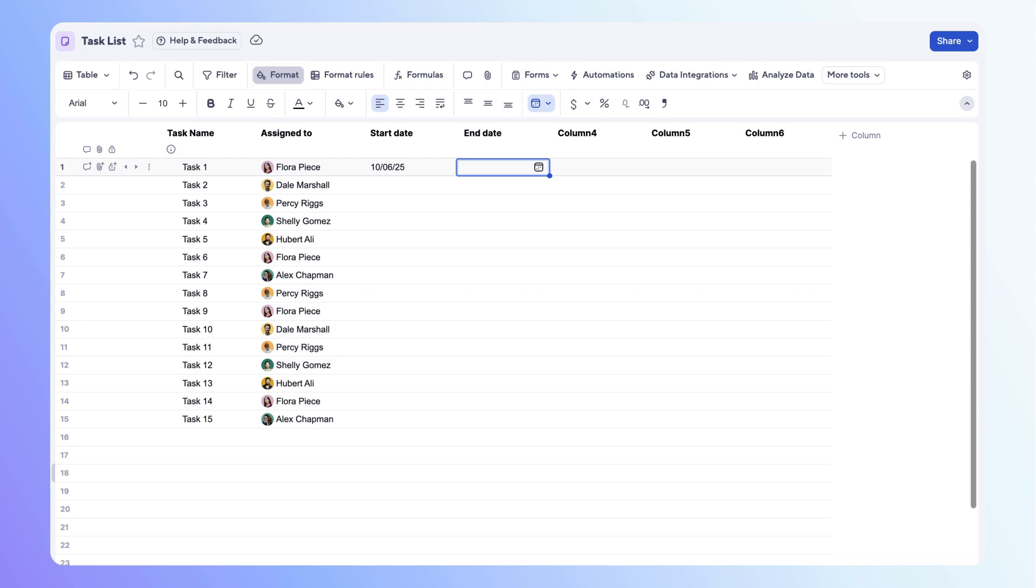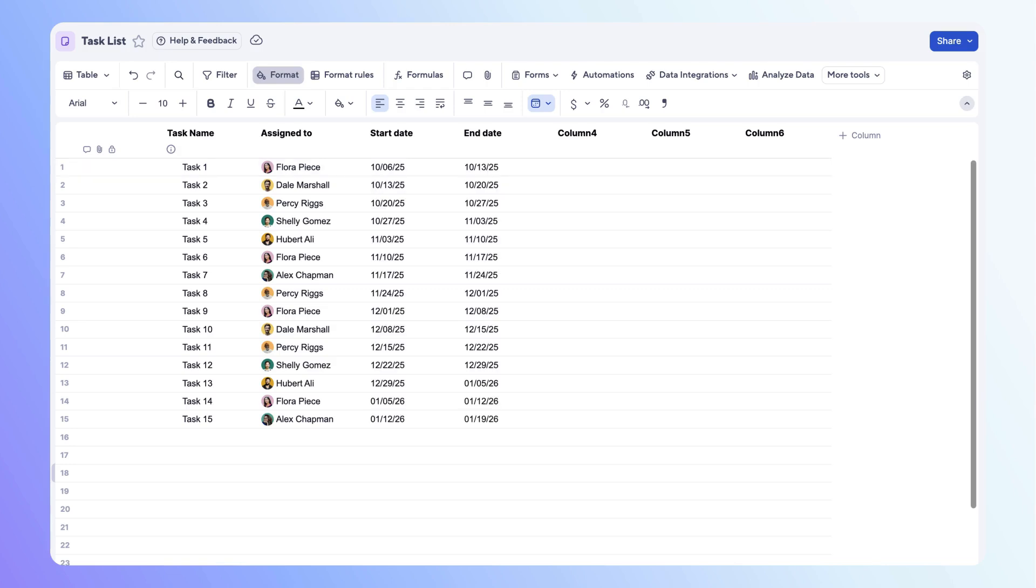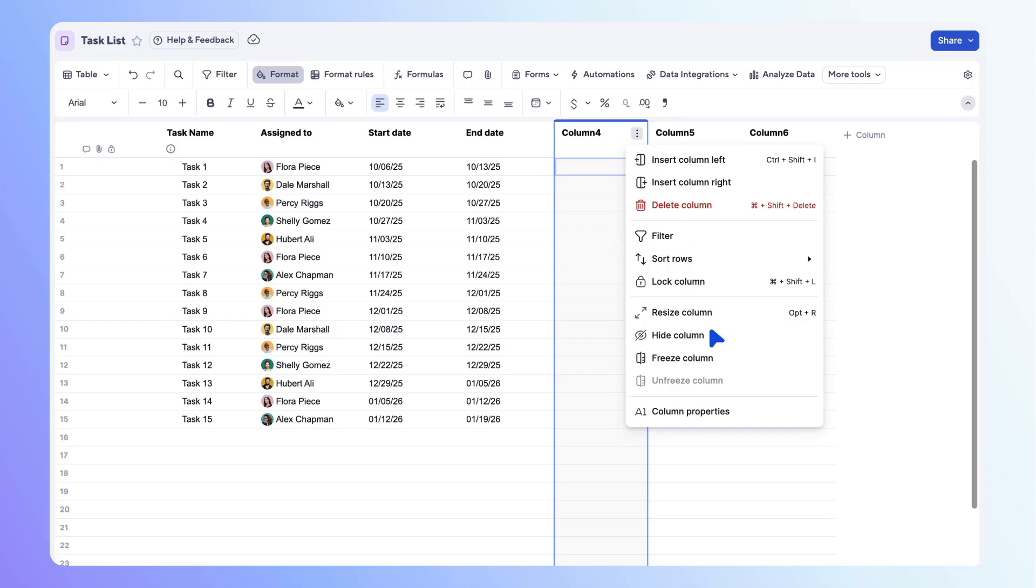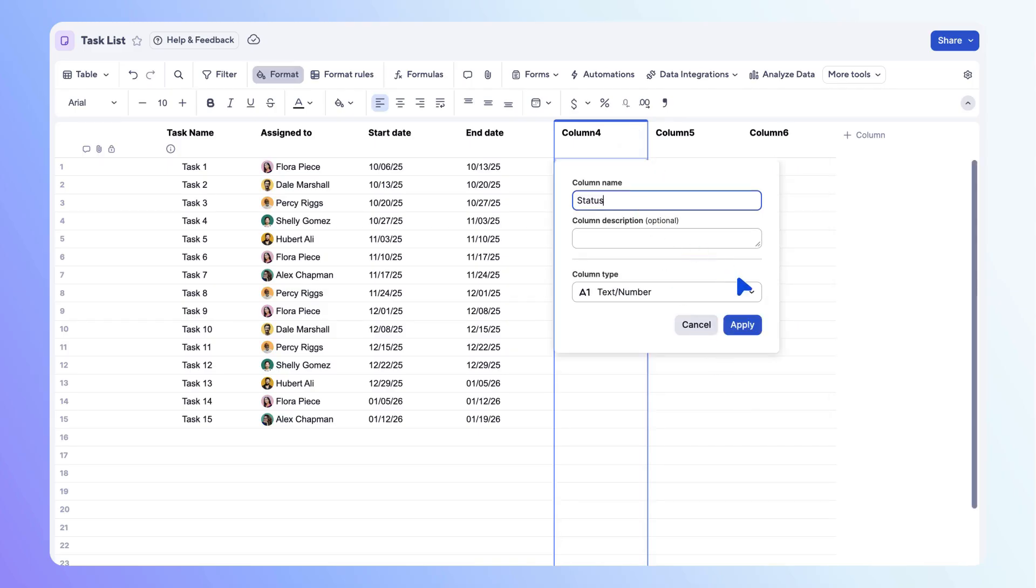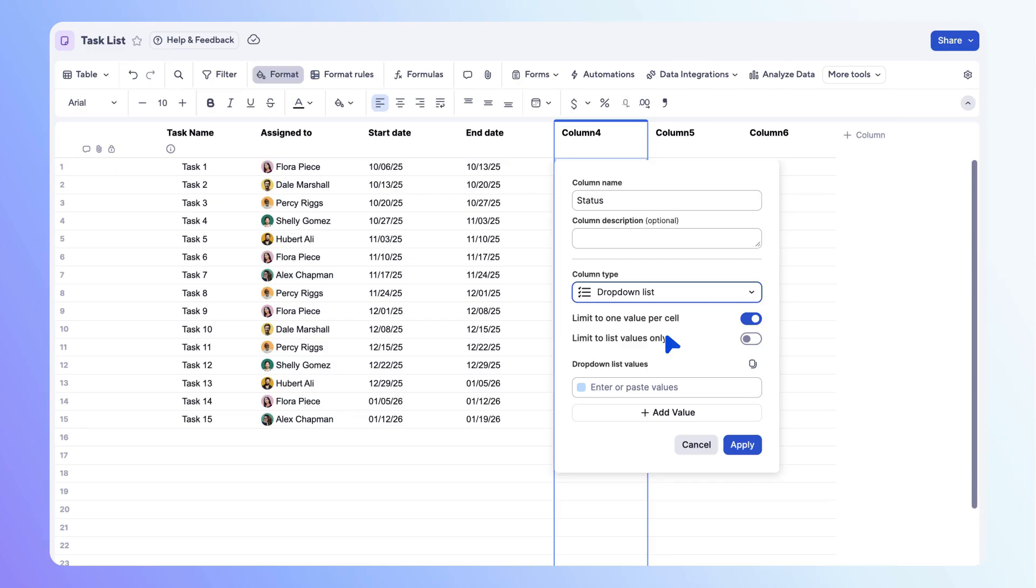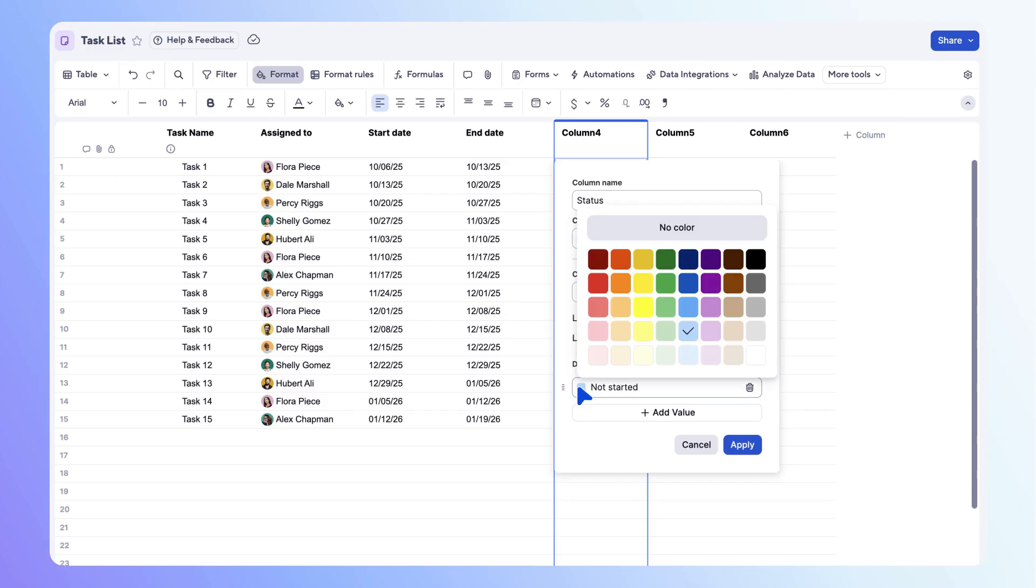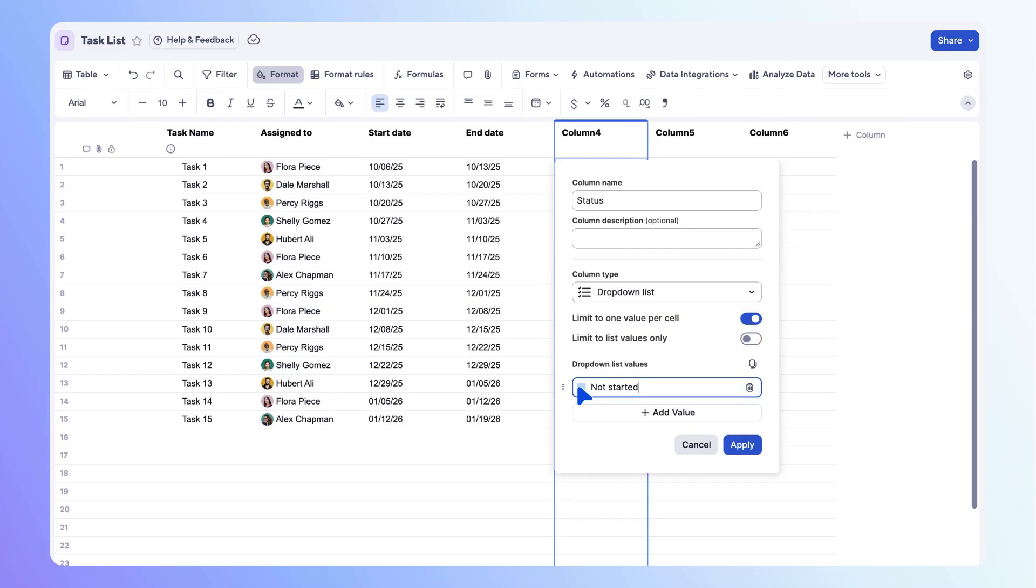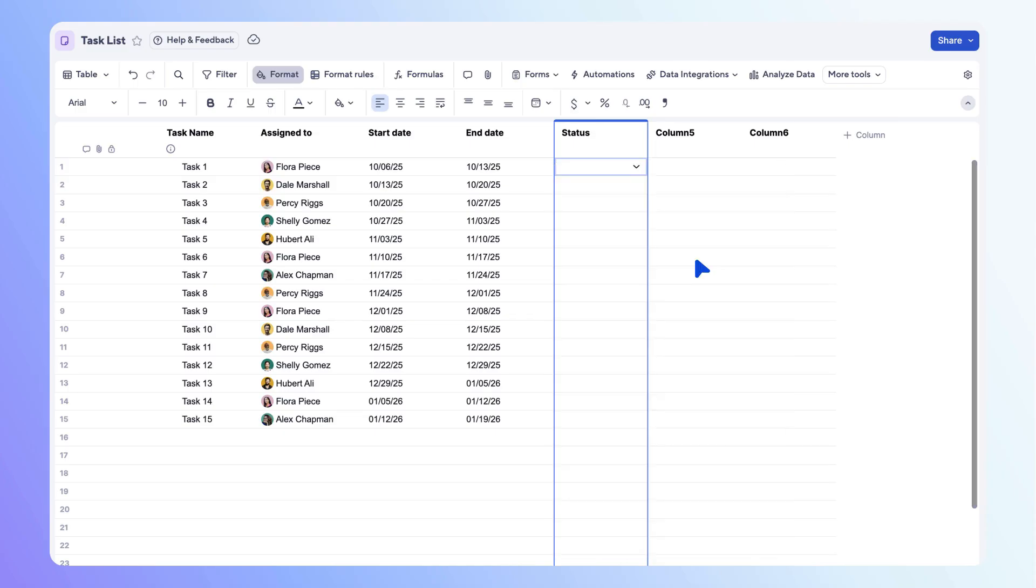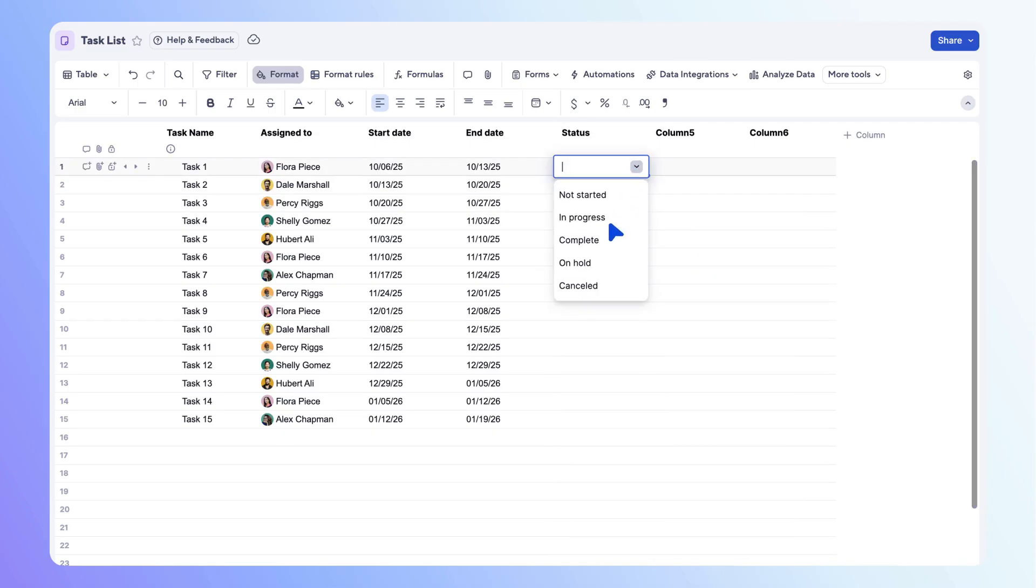Next, let's add a drop down list column to track the status of each task. Select drop down list from the column type options. You can adjust the settings to be single or multi-select and restrict from list values as needed. When you add list options, use the color box to remove or change the assigned color value. Add the rest of the status values, then select apply to save your changes. Now you can add a status value for each row.